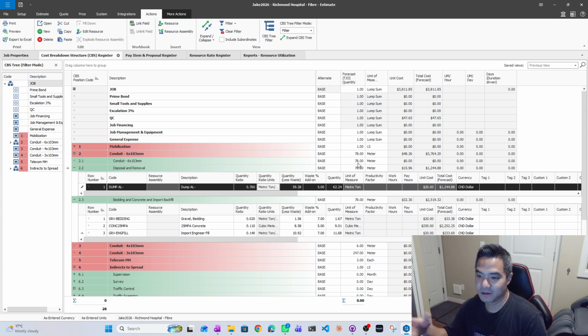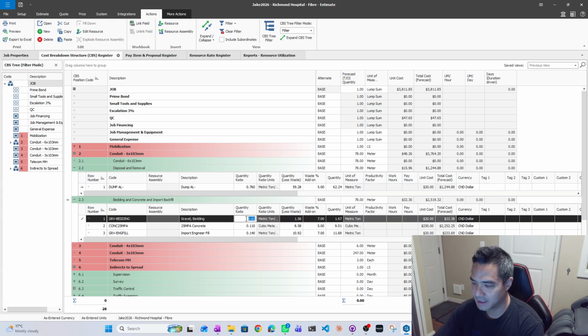For my scenario here, the material is AL minus, so this is very clean disposal material. Now going to bedding, typically I'm allowing around 2.5 for bedding. So you're taking this and multiplying that. This would be 0.05, with the 0.02 per meter times 2.5.